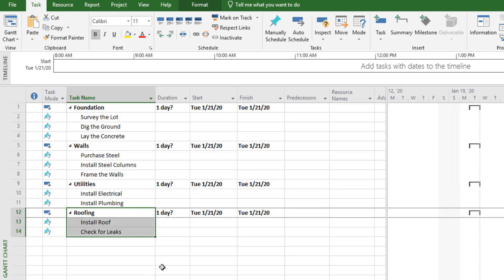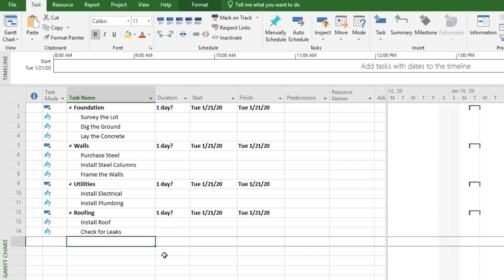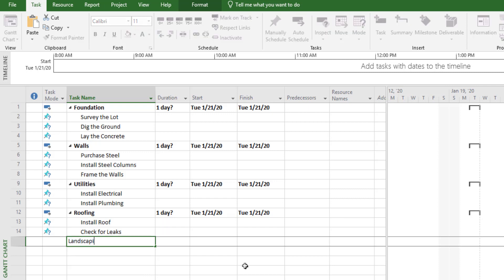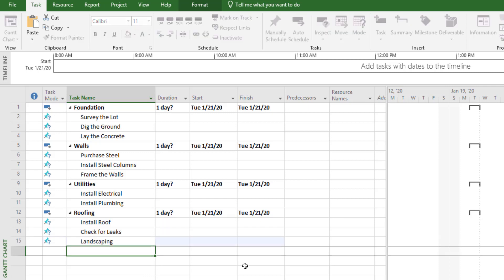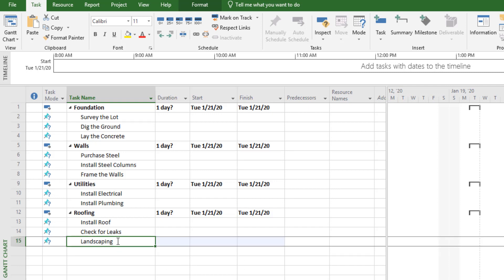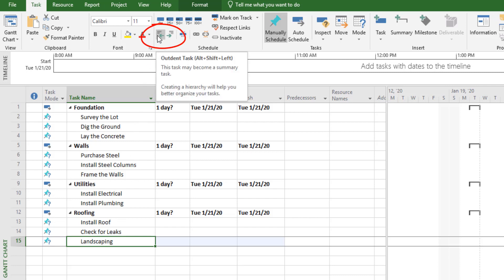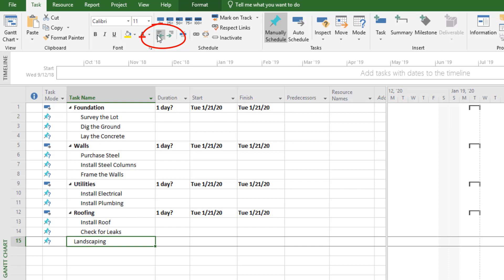Let's say we need to add some additional work, like landscaping. We'll go to the bottom and type in landscaping. What you'll notice is it's rolled up under roofing — we want it in its own category. So we're going to select landscaping and out-dent that task so it's in its own section. We want landscaping to be its own group.